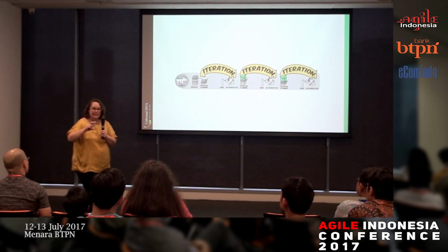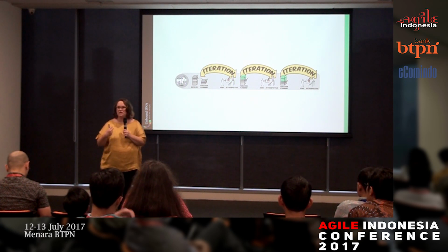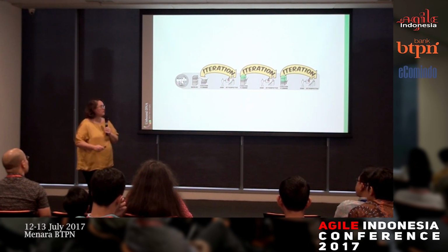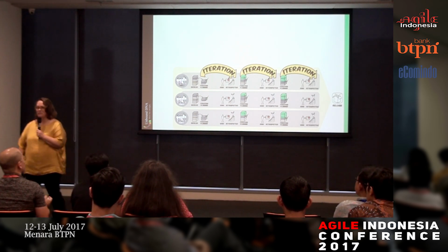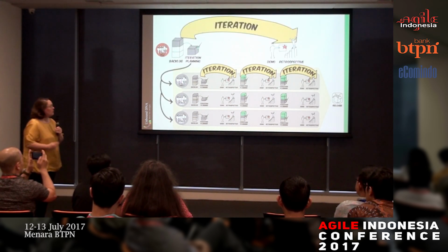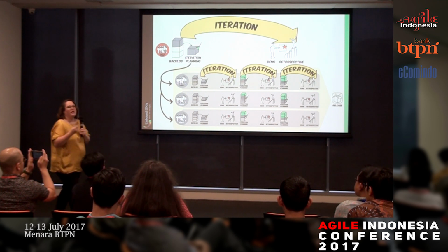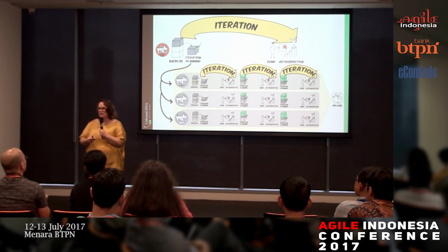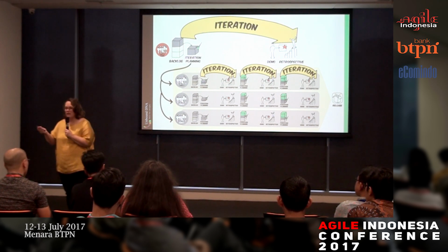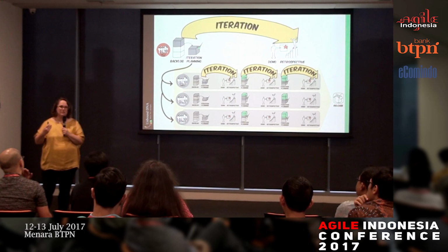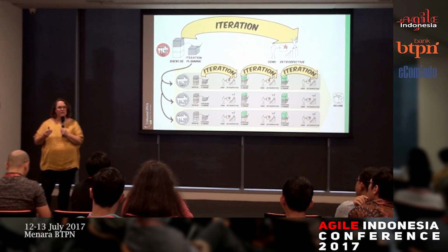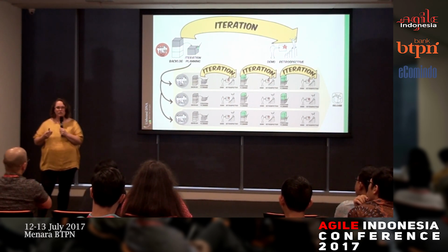And so as a leadership cell, whilst the teams were delivering in their iterations, many teams delivering in the same heartbeat across a similar release, we as a leadership cell would do this thing called a meta iteration or a meta sprint, where generally the way it's worked for me is around about 6 weeks. So 3 iterations.